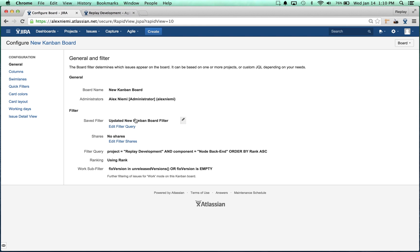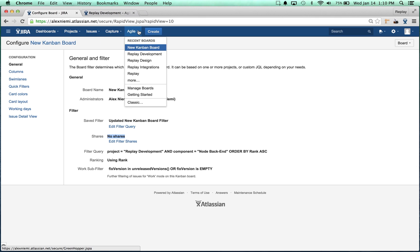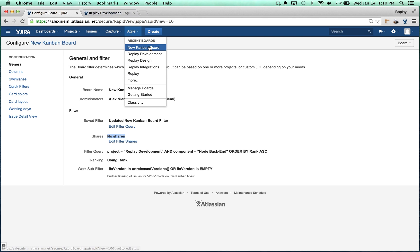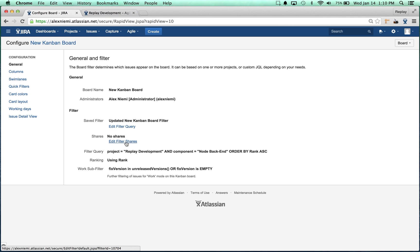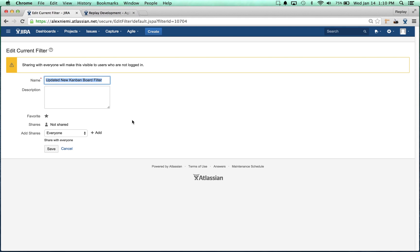The last thing, this is the most important thing in terms of getting this shared - right now if you were to send this to anybody on your team or ask them to go to it, if they went to projects, if they went to Agile manage boards, they wouldn't see it there and they wouldn't see it in their drop-down. What you have to do is click on Edit Filter Shares.